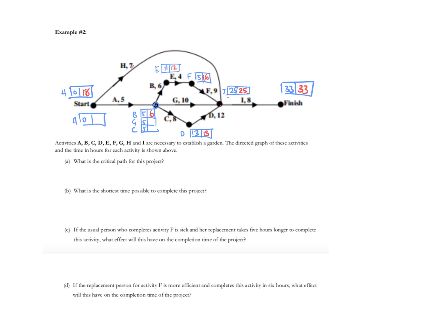Now I'm going back to the I. So 25, I'll go to D. 13 minus 8 will be 5. And that's going back via C. Or if I go back via G, 25 minus 10 will be 15. Okay? So we need to have them in case they ask what the float time for one of the individuals is. And then going back, remember you pick the smallest. So C's the smallest, 5 in the red. And then 5 minus 5 is 0.